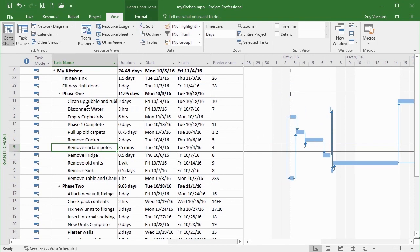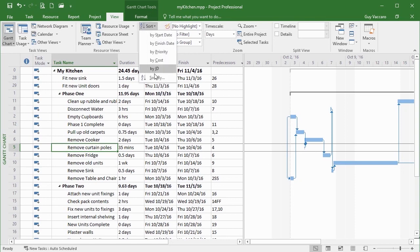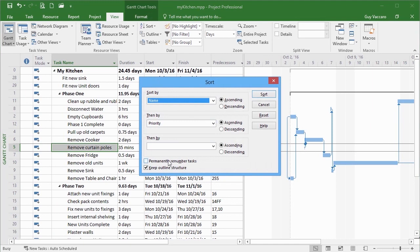You might use the sort as a way of moving tasks before you link them up — otherwise your Gantt chart will look a little bit crazy. So if we go to Sort and Sort By, we could sort them and then choose the option to permanently renumber the tasks. It will move them into their new sort order and then renumber them — exactly the same as if we'd cut and pasted or dragged them to their new location. It may be that you get all your tasks in, then sort by start date, and then permanently renumber them. Whatever makes things easier for you, that's the whole point of using the software.